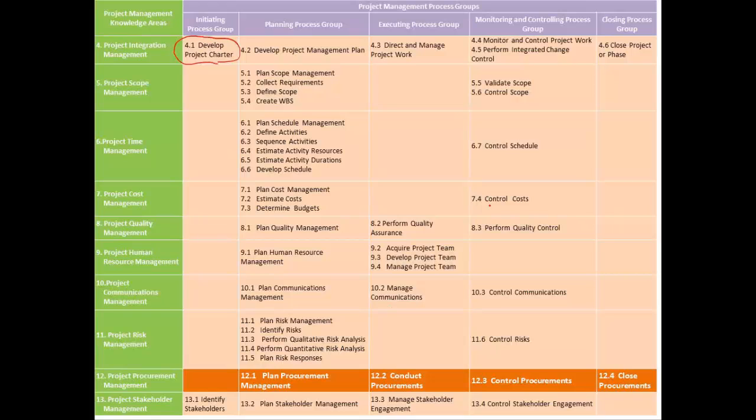Similarly, let's say control cost. This is another project management activity which is all about comparing the project's performance in terms of cost or budget against the cost baseline, to find out if there is any deviation from the set baseline. If there is a deviation from the baseline, as part of this process, we would raise a few change requests in the form of corrective or preventive actions.